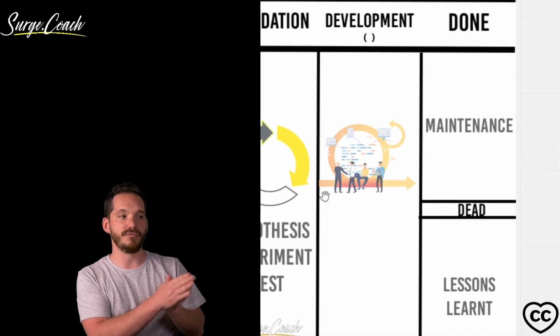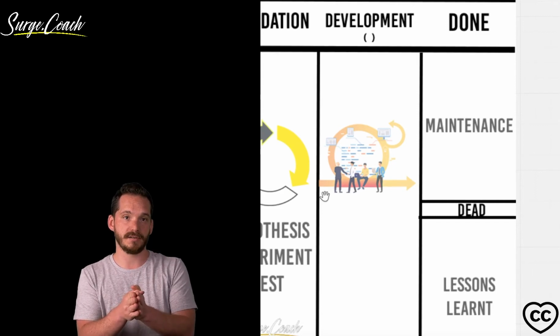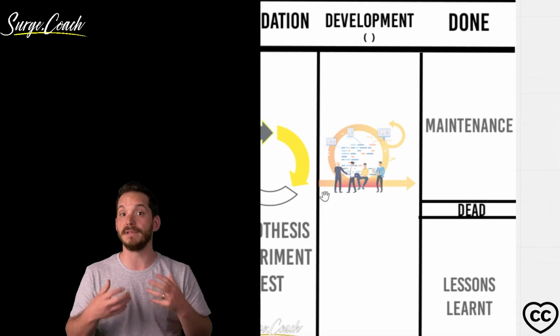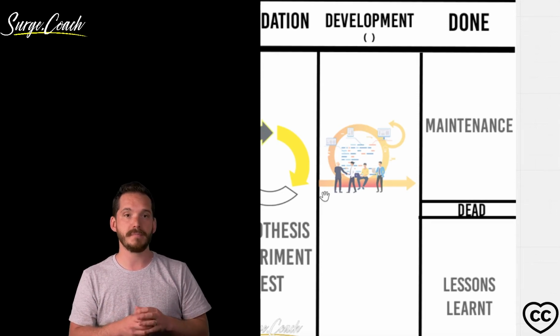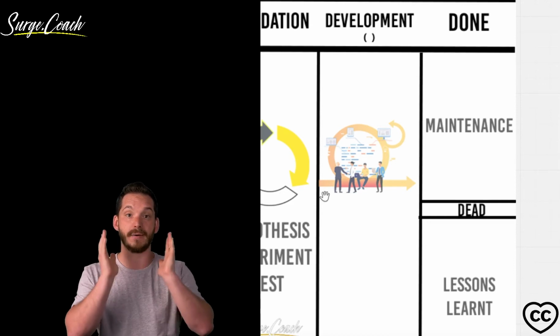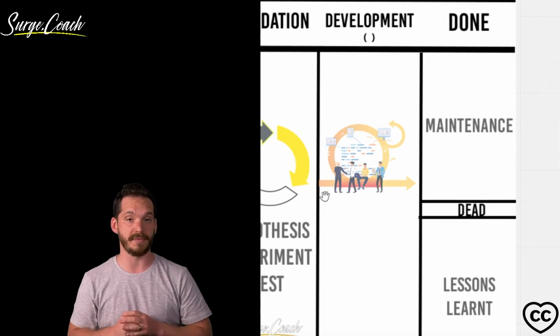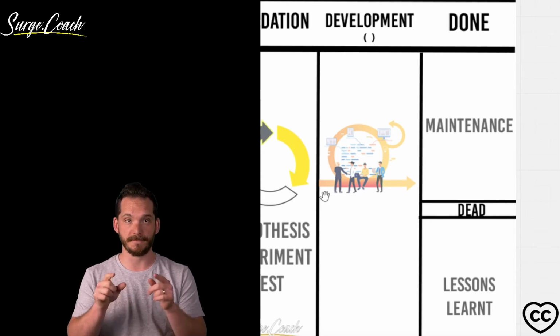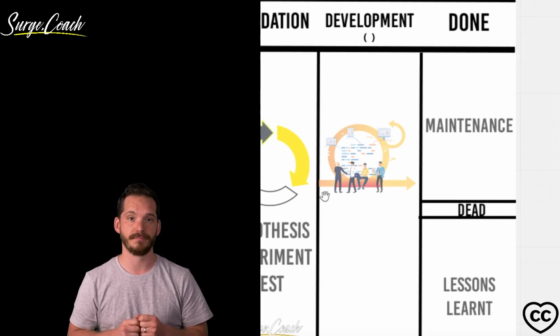So it must be ready for the development of value to start. There should be some sort of definition of ready for the development teams. They will probably have different definitions of ready. But the main thing is it's been validated. It's okay for development. It's now in their backlog to pull at their leisure. You will have a work in progress limit for that development section as well.